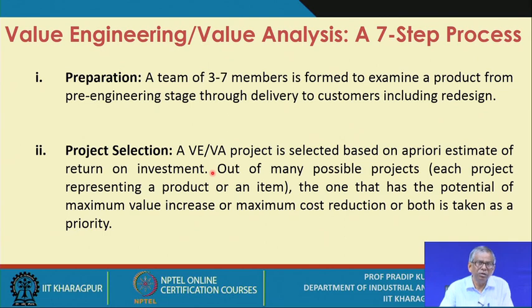Now obviously there will be a study, and associated with the study there is a cost. So you must be able to estimate the expected cost of study, where both the fixed cost as well as the variable cost you must consider. And then this cost is essentially an investment. That means you expect a certain return out of it. So what are the benefits you might get? So that also you must have a very clear idea.